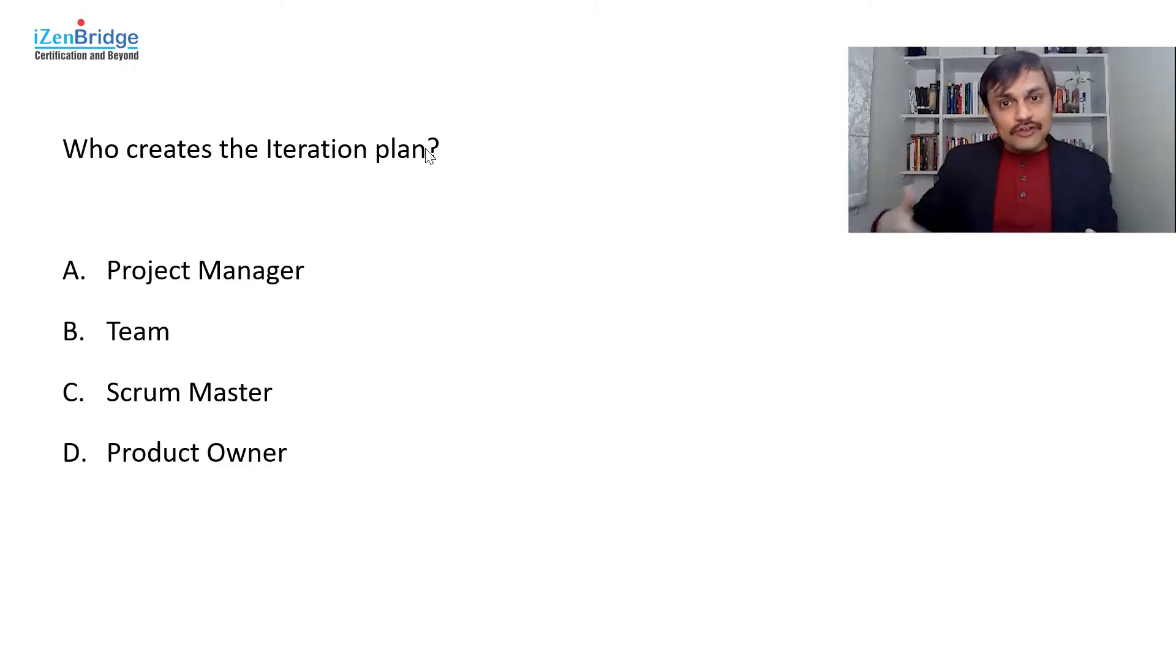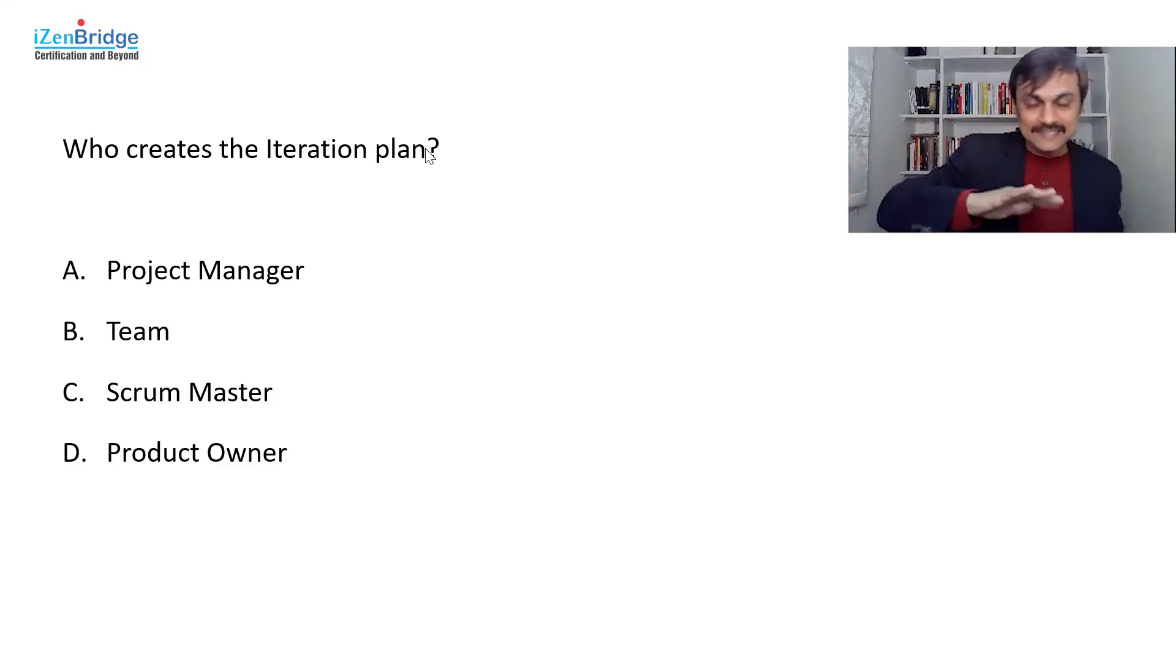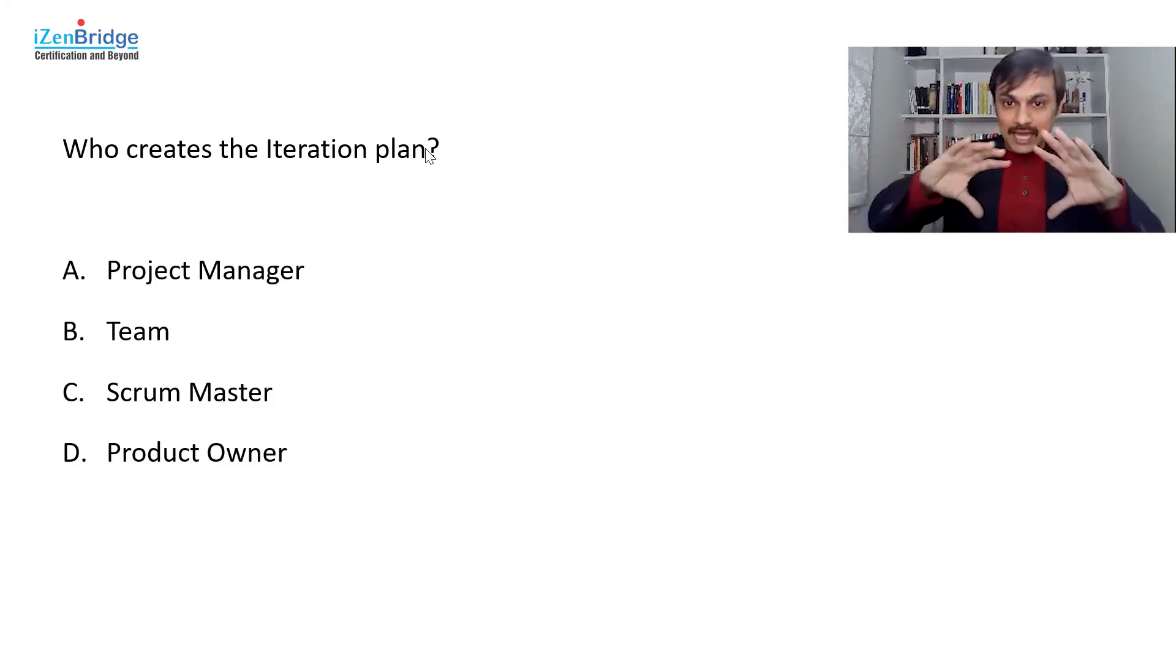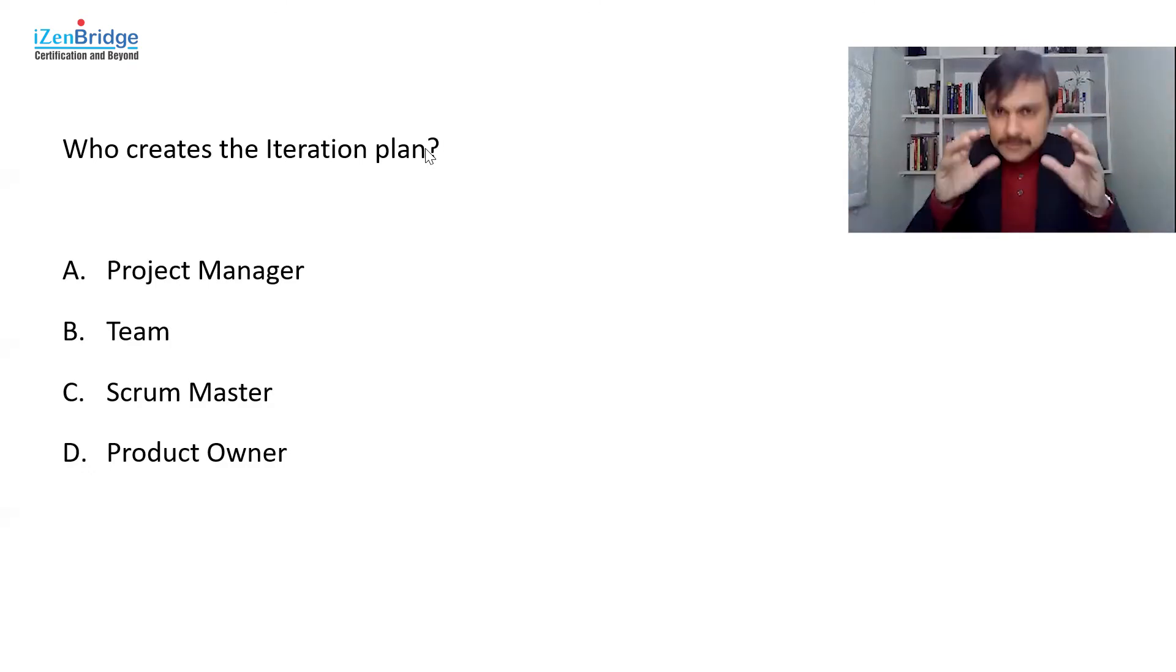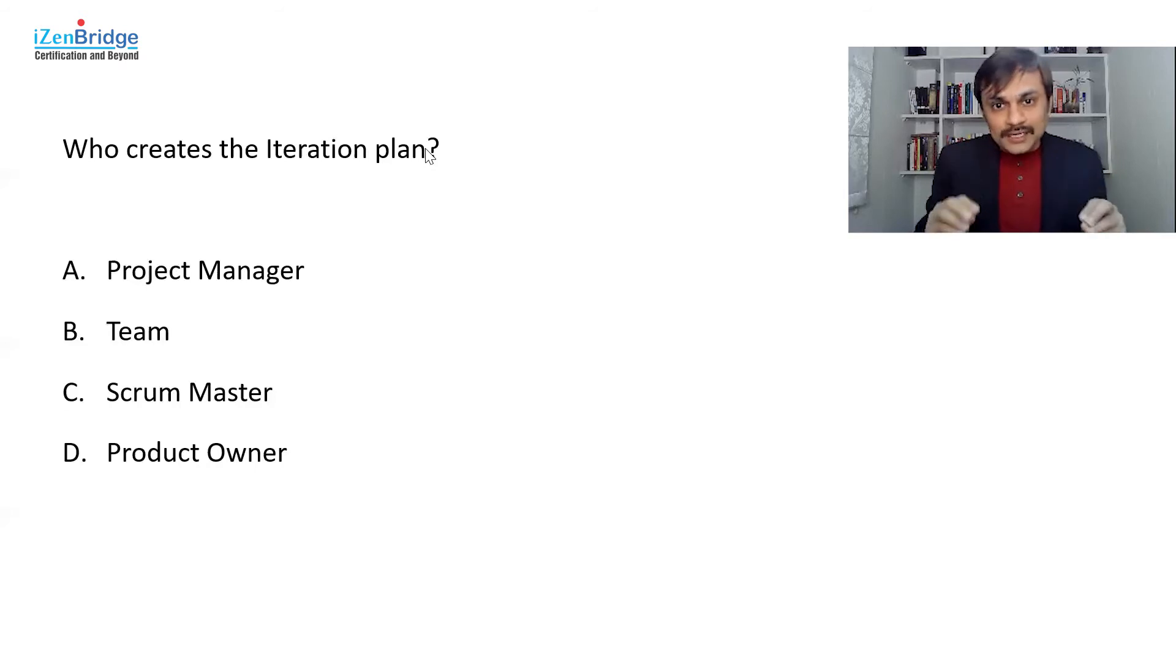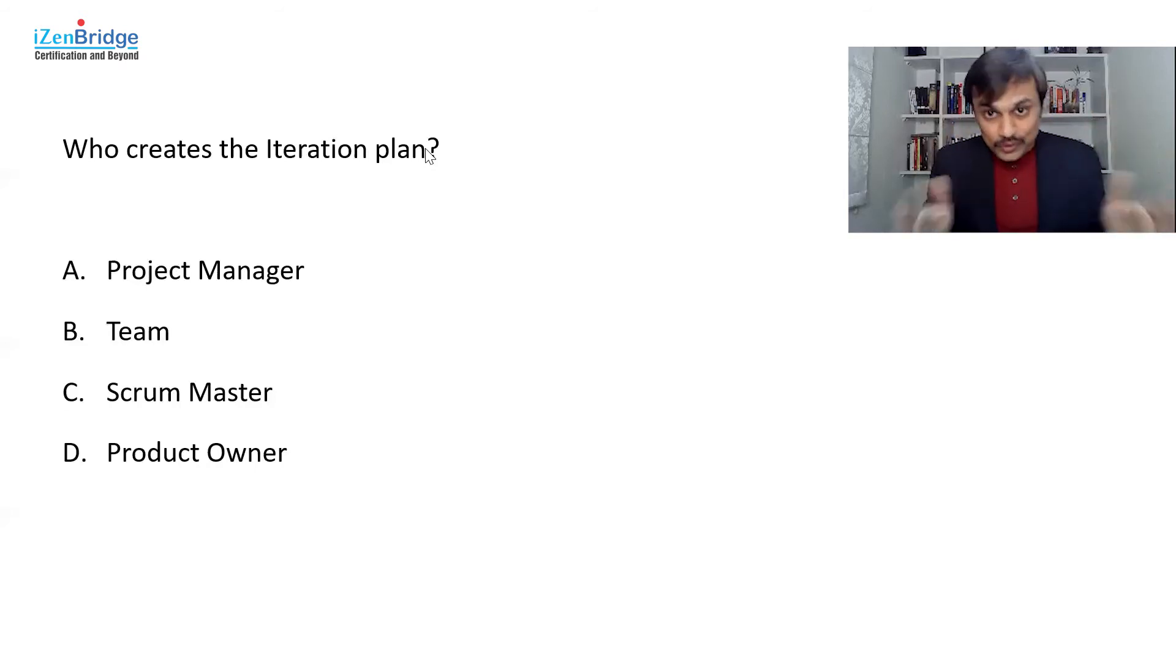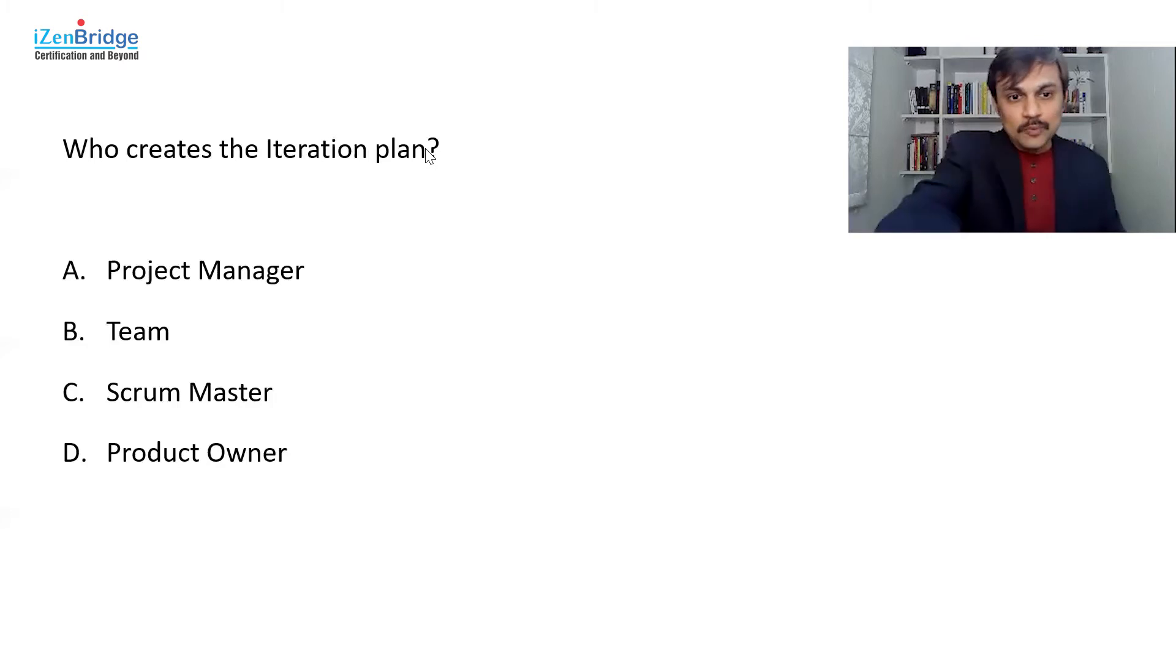So Agile way of working, the project managers are more on facilitating space, more or less in an environment creation space, and letting, especially the detailed level planning, should be done by the team, not by the project manager. So that's the whole idea. So project manager goes out.